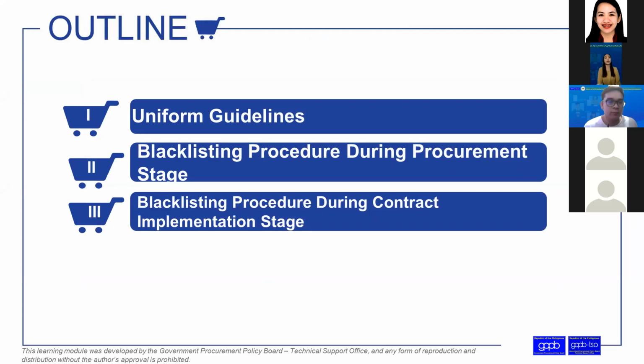With the bidding during procurement stage, what is at stake is only the bidding procedure. Marami pa namang ibang bidders, di ba? Tsaka may bid security tayo. But when it comes to the contract implementation stage, of course, ma-affect na yung mga projects na ongoing. Tapos, yung performance security, andyan din naman yan. Pero yung top concern natin is what will happen to the project, especially ongoing na siya.